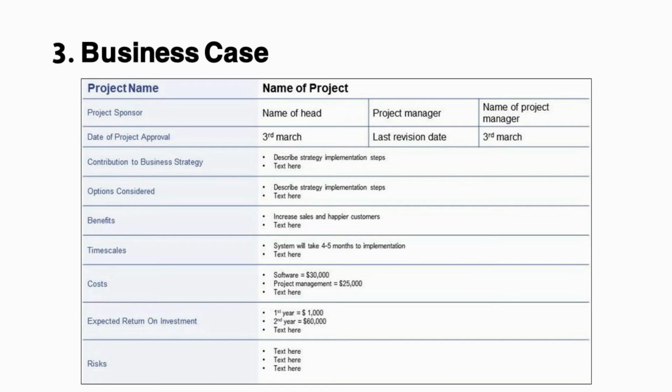A common way of thinking about a business case is using these five elements: strategic context, the compelling case for change; economic analysis, return on investment based on investment appraisal of options; commercial approach, derived from the sourcing strategy and procurement strategy; financial case, affordability to the organization in the time frame; management approach, roles, governance structure, life cycle choice, etc. The business case is reviewed and revised at decision gates as more mature estimates and information become available.